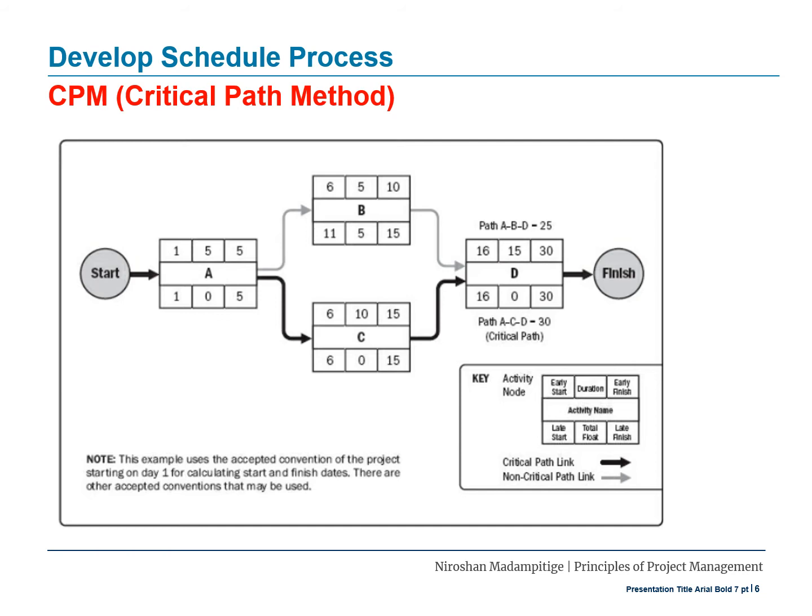Once the total float and the free float have been calculated, the free float is the amount of time that a scheduled activity can be delayed without delaying the early start date of any successor or violating a schedule constraint.